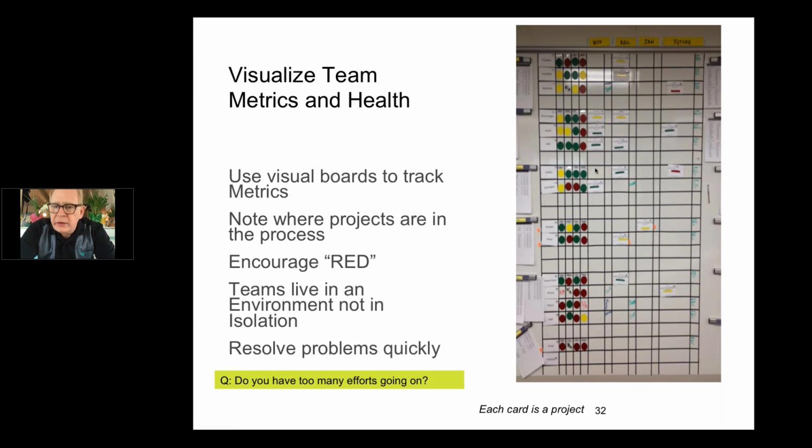the teams were required to have certain elements in their room. And the required elements were agreed to by the entire organization, so that anybody should be able to walk in and they would have these red, amber, green in their team room. They would have the data that supports red, amber, green, and they would have their team's velocity and a quality metric. And they would also be required to have written up the two or three process improvement items that the team was working on, because they were a big continuous improvement shop. So those were the items that got rolled up to management and executives.